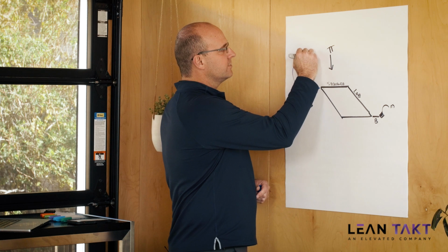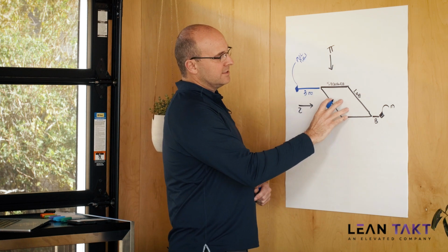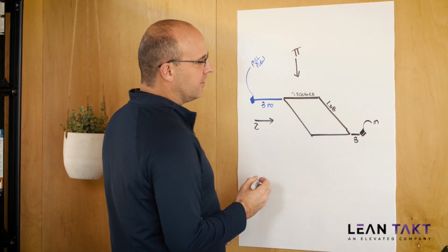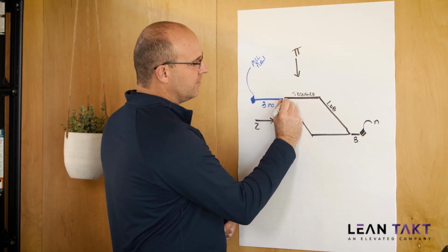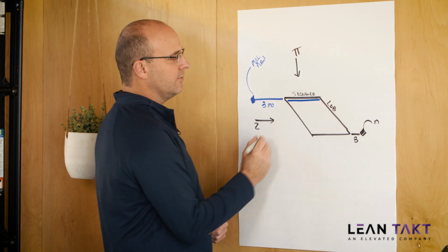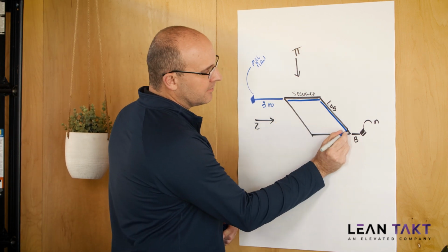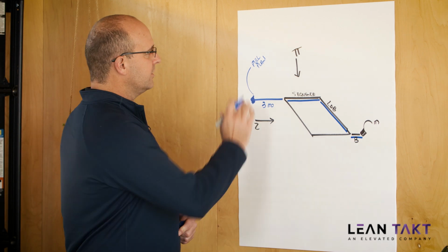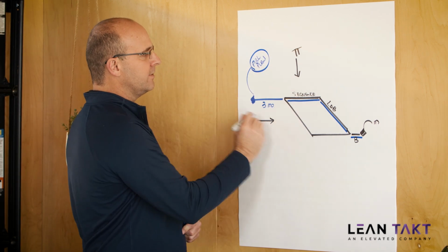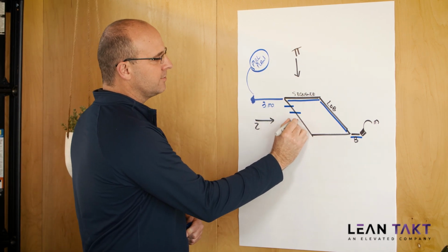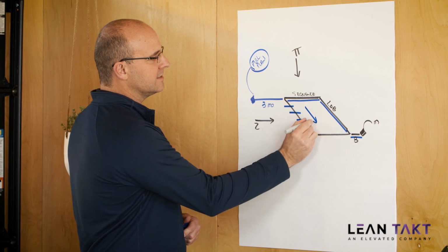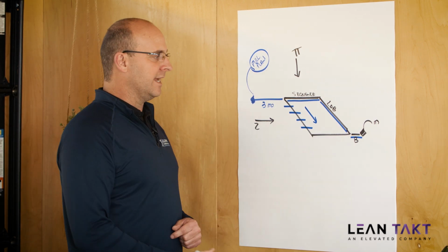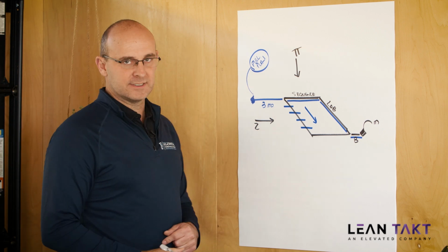If this is a macro level phase, and this is what you promised, you will want to do a pull plan that confirms the sequence and confirms the line of balance and tells you that you can gain the buffers. This pull plan is a normal industry pull plan, but it goes through multiple zones, and you're analyzing that trade flow. If you, at every phase, do a pull plan 3 months ahead, you're going to be set.